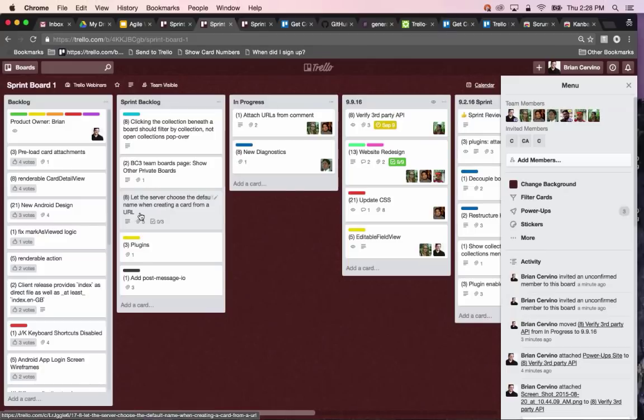It can be a way to quickly make sure your team is not overworked or overloaded with work during a sprint. The reason why you use a nonlinear system like the Fibonacci sequence is because true estimates are difficult to make. And the bigger the task, for instance, this one has a 21, a very large task, the more uncertainty revolves around it. So using the Fibonacci sequence recognizes that difficulty without producing a false level of confidence for the specific level of difficulty. And in a moment, I'm going to show you two useful items that can really help this process of adding points to cards.